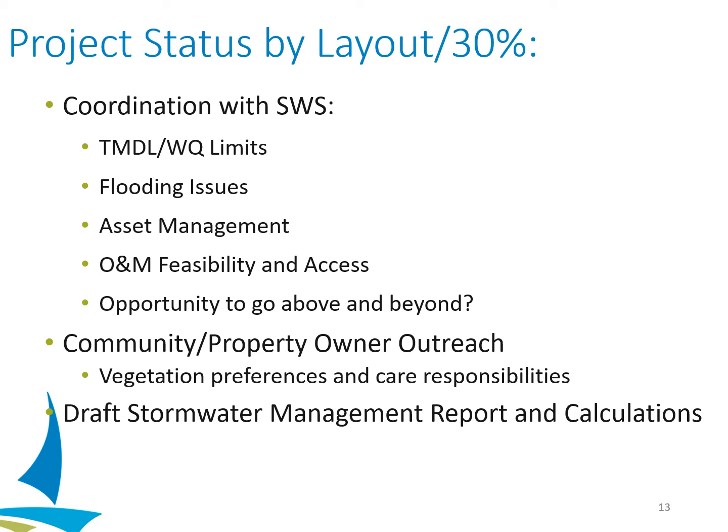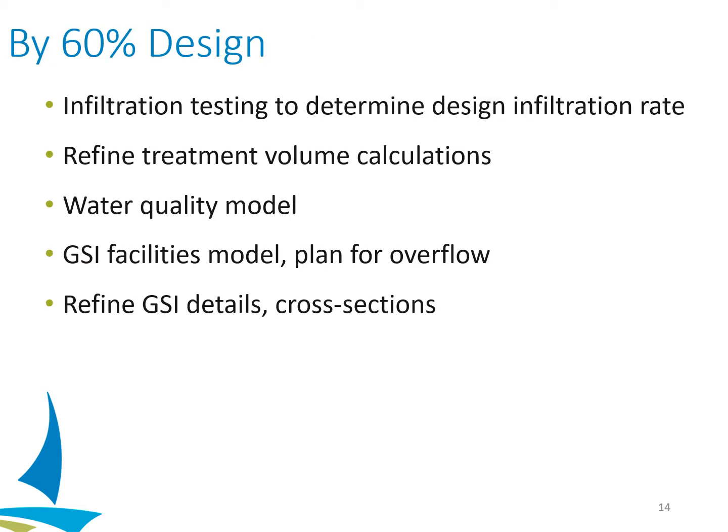We also want to start doing community outreach to understand if there are any preferences or issues with providing care, especially on places like a boulevard where it will be adjacent property owners in their space and potentially part of their care responsibilities. By layout or 30%, we should start seeing a draft stormwater management report and the calculations I've mentioned. By 60%, we should be taking a finer point to the work done by 30% — we should have infiltration testing results so that we can have a design infiltration rate, start refining those calculations, have a water quality model set up to demonstrate removal efficiency, and have an understanding of how the GSI facilities work in larger storm events.